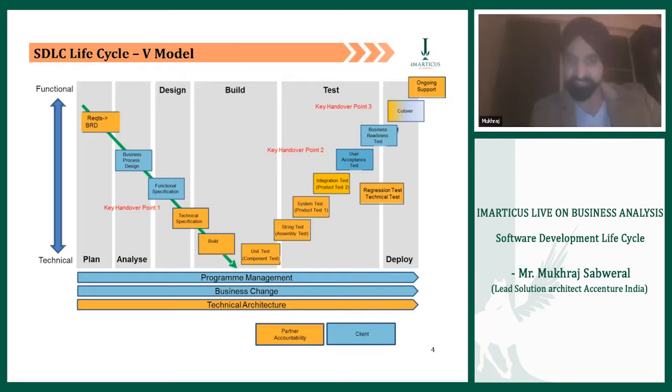In this business requirement document, BRD, he captures everything I told you guys earlier. He assesses the as-is, he analyzes what could be a possible to-be, he does a cost analysis, benefit analysis, risk analysis, challenges, and so many other things. He captures all kinds of requirements which he has understood in terms of shaping up this to-be product. Requirements from the shop floor guys, from the IT guys, from particular business guys. All kinds of user requirements, non-user requirements, quality related requirements, and so on, are taken in. All of that is put into a single Bible called BRD. This was the prime deliverable from Rajesh's side.